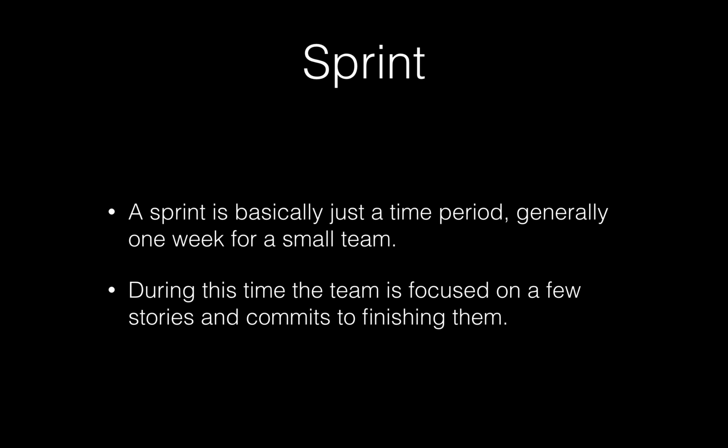During this time, generally, the team takes a small subset of stories or issues from the backlog, and that's what they're focused on. They're putting all their effort into that. They're not looking at any other stories. They're trying to make the stories that they've selected as good as they can be. Even if you're done developing, you generally help QA. But as a team, we need to finish those stories. That's how it works.